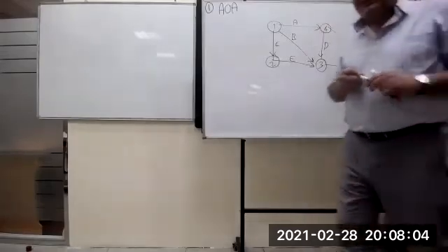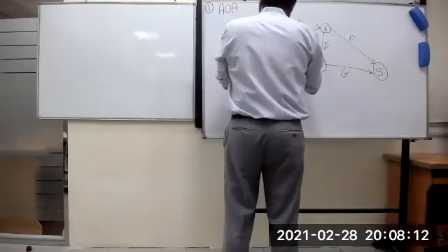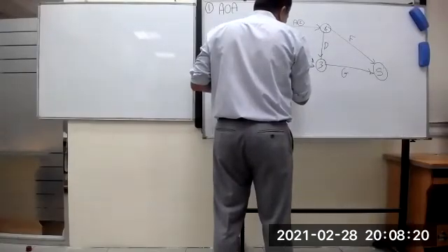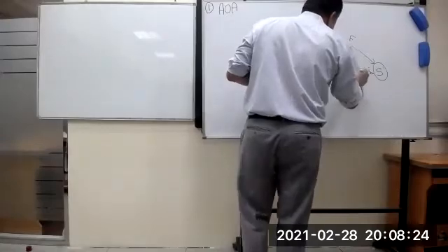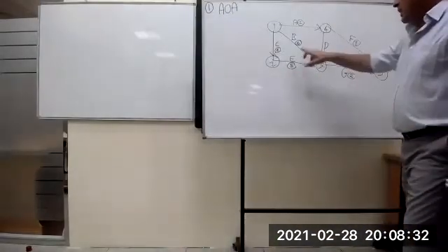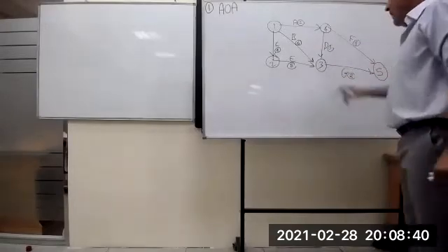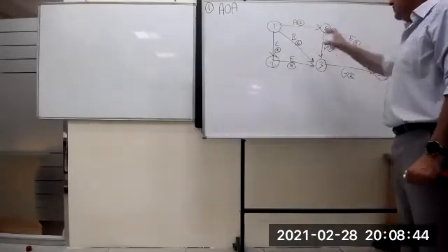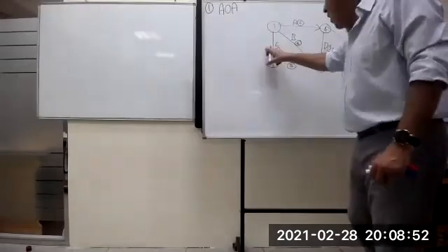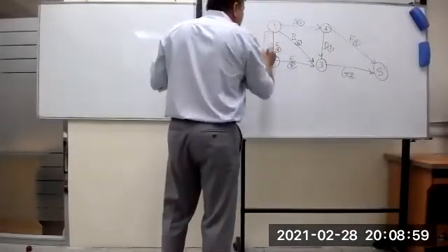Calculate with me, what is the critical path? A, how many days? 2 days. B, 6 days. C, 4 days. E, 5 days. G, 2 days. F, 4 days. D, how many days? 3. A with D is 2 plus 3, then A with D with G is 2, 3, 2, which is 7. B with G is 6 plus 2, 8. No. Here I have 4, 5 and 2, which is 11 days. So this is my critical path.